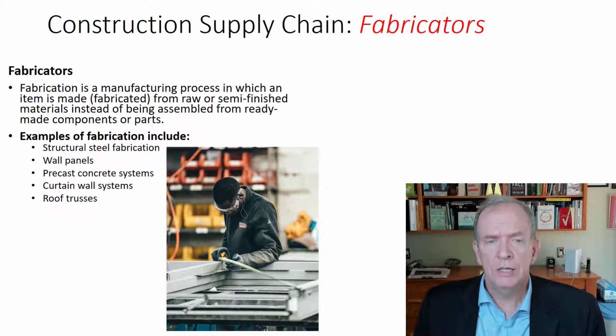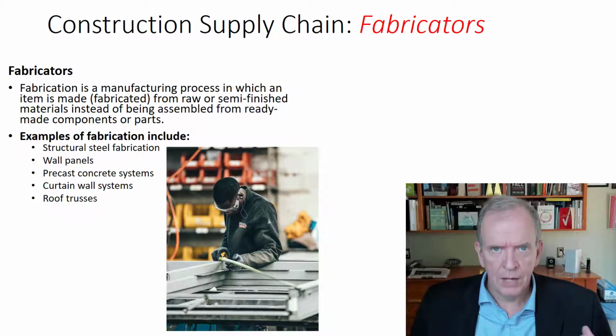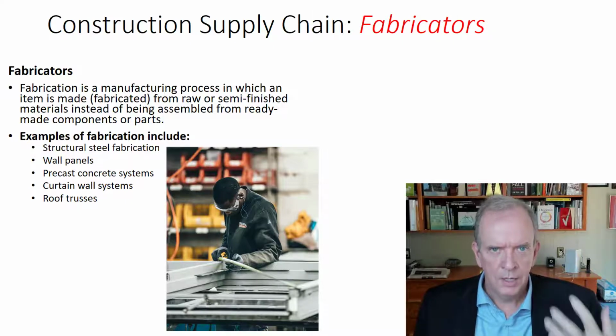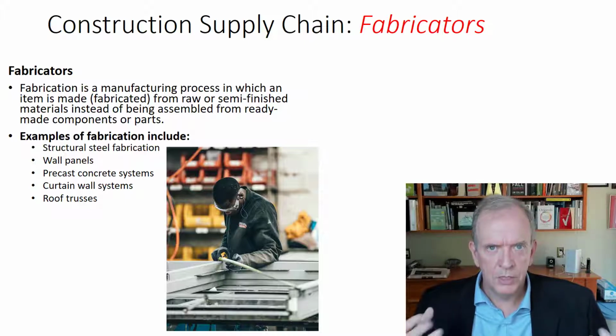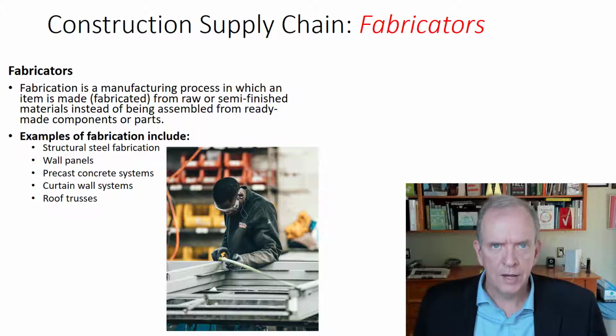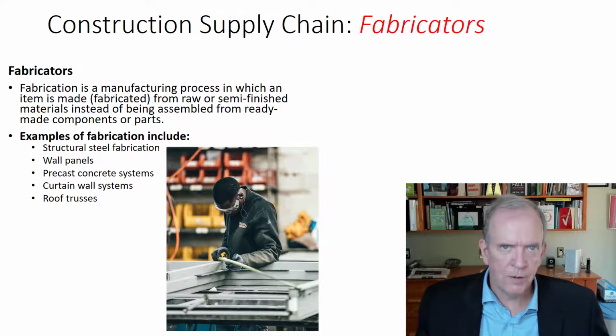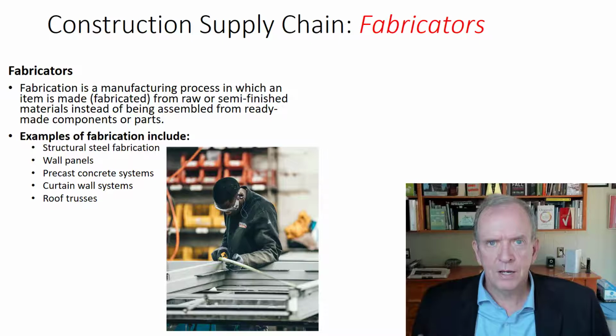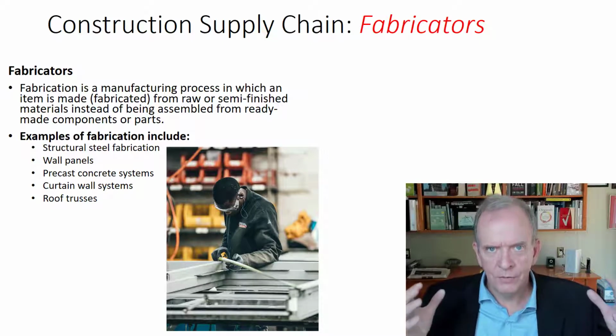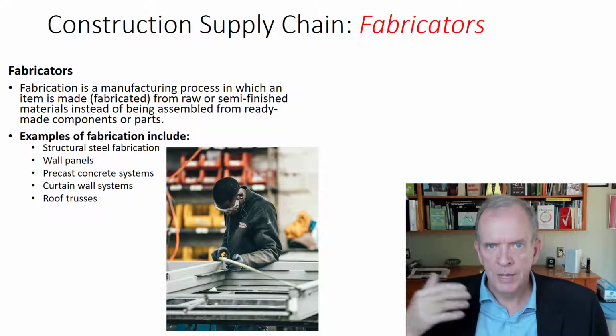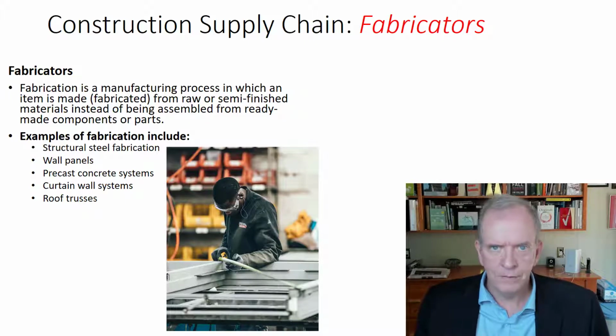So fabrication, this is becoming more and more pronounced because you can really get into a manufacturing process with fabrication, which means that you can cut time down. Instead of fabricating ductwork on site, it's much better to do it in a shop because the shop is better equipped for fabricating ducts. Otherwise, you're trying to set up a little mini shop on site, and it's probably not going to be as organized or as good as a full-scale fabrication shop that is used to turning out things very, very quickly.